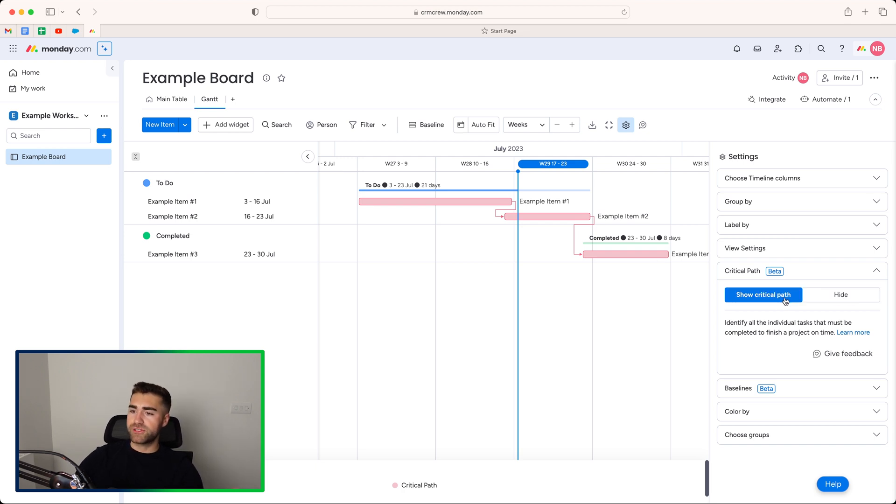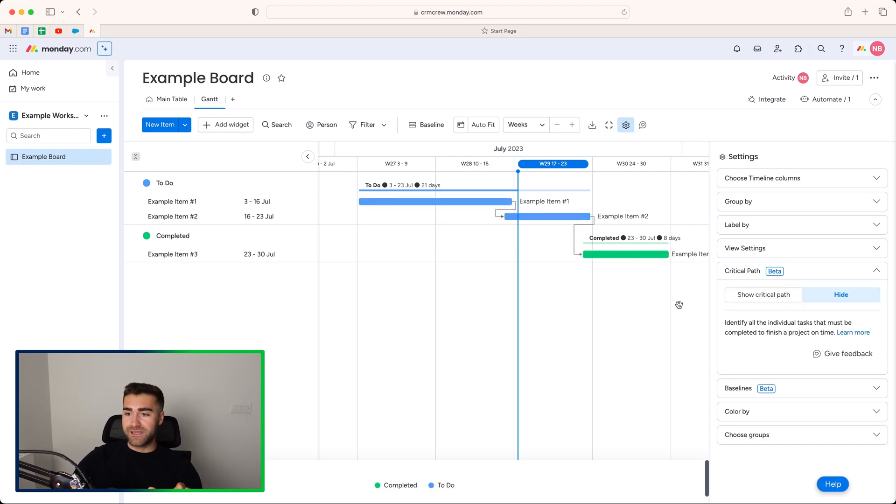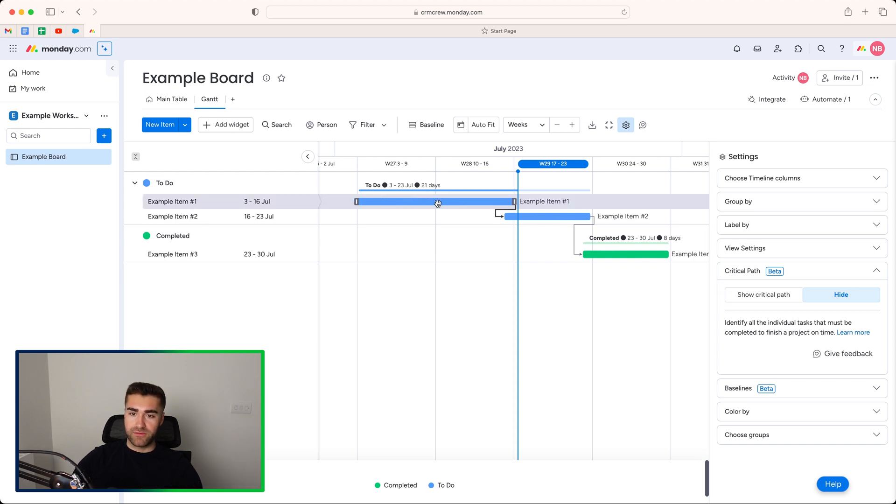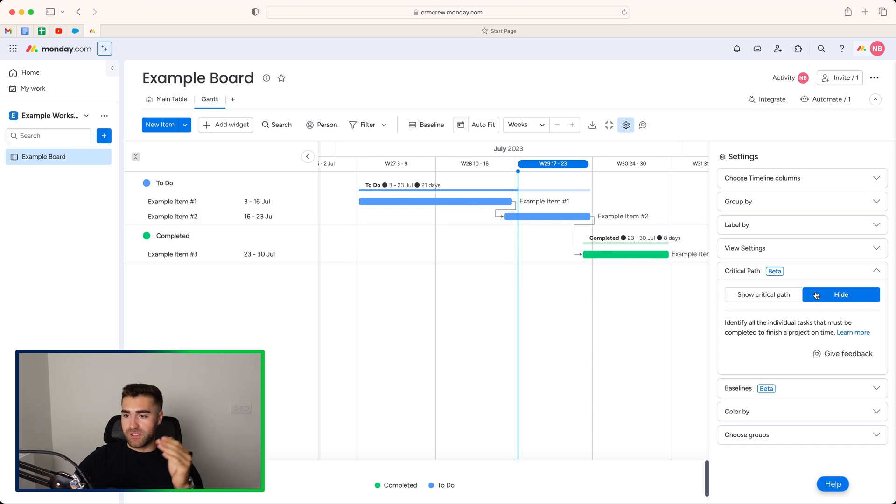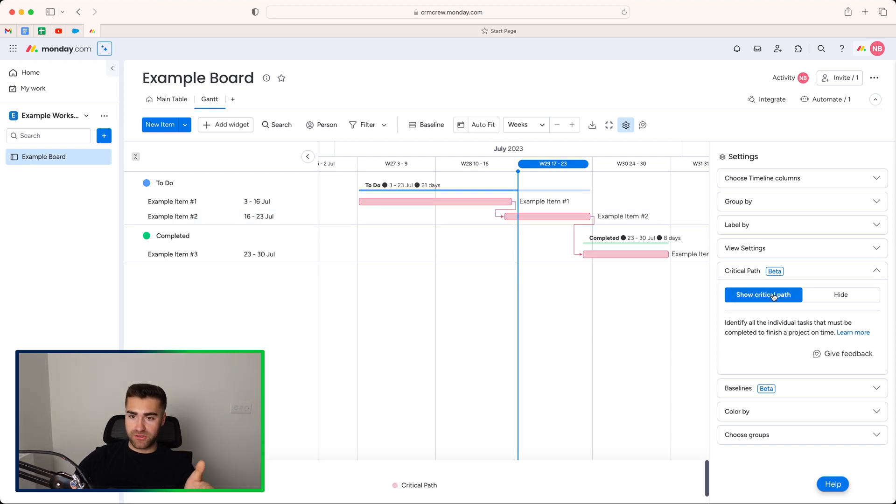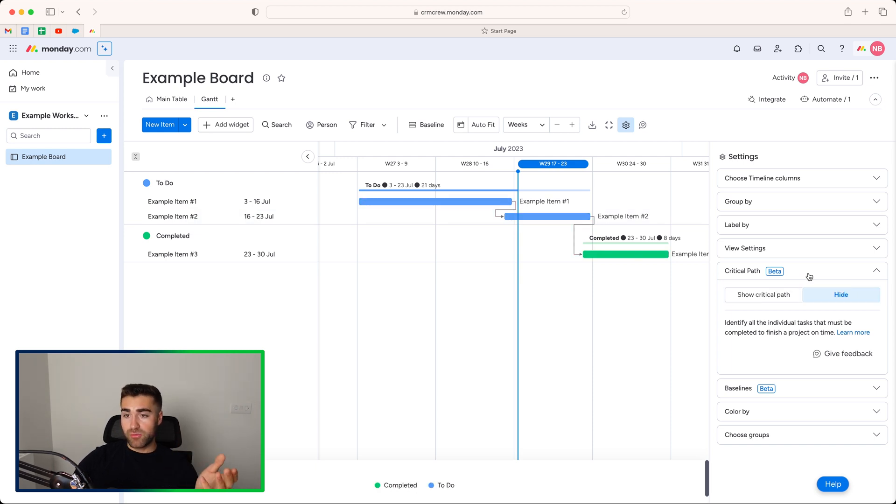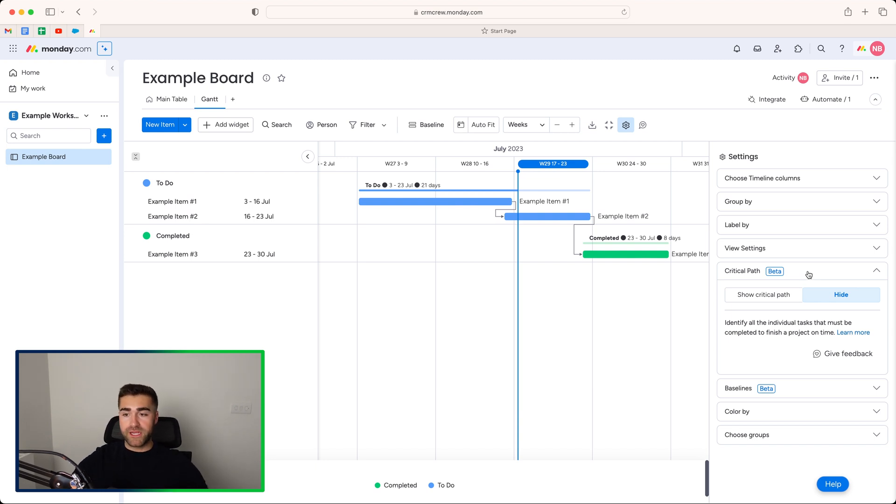So you might have 80 projects on one Gantt view, and then you just want to show the critical path for each project. And there are going to be loads of items associated with each project. This will show you the critical path to get that completed. And it will look a bit weird when you've got loads and loads of items, but it is actually really, really useful. So you can choose to show that or hide that. If you're not using the dependency column, it will just highlight one as red. So they'll be red as opposed to connected like they were there. So that's a critical path. Very, very useful, especially when you've got lots of information on a Gantt view.